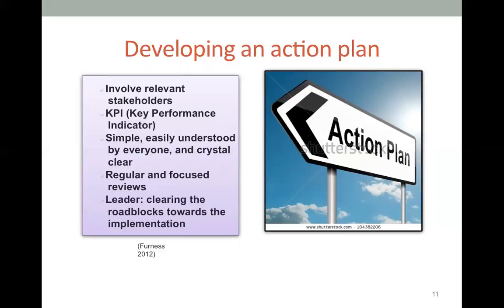Let's say one of the risk events that we've been discussing is that competitors may slash their price, and the action point here is to introduce tactical promotional activities to cushion the impact. The key performance indicator here could include whether the promotional activity has been prepared accordingly. So when competitors really reduce the price, we can just launch the activity.